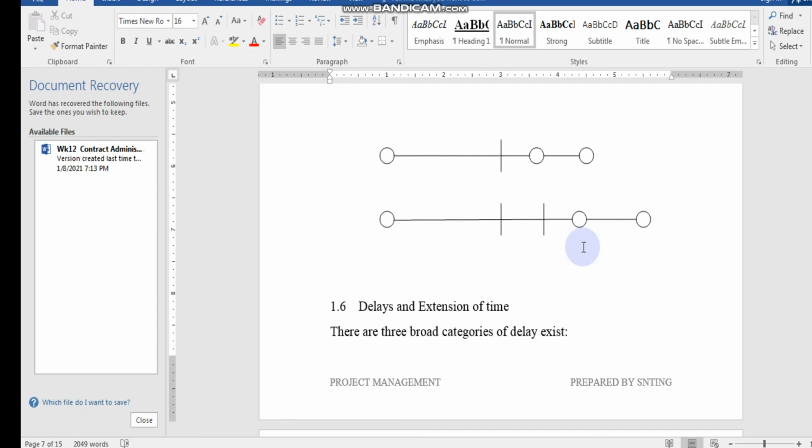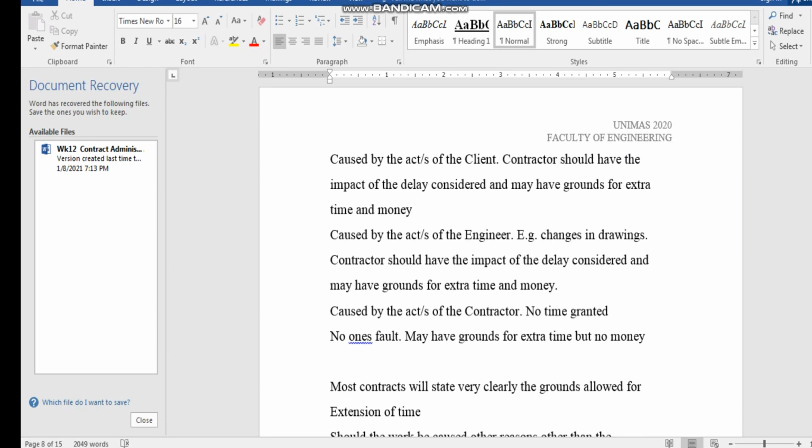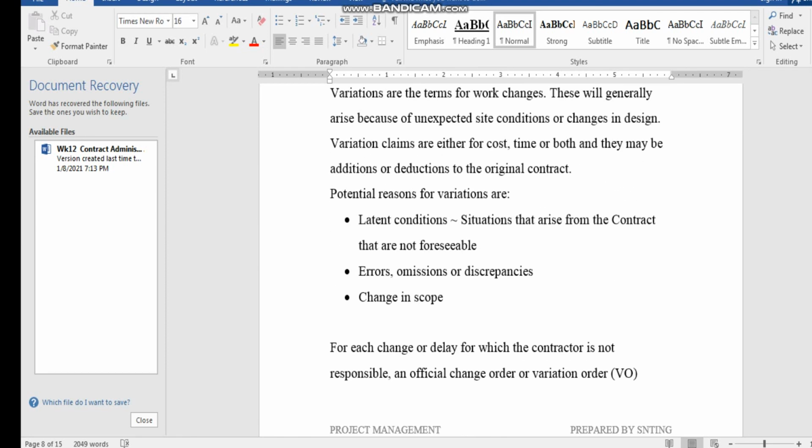And next thing, of course, is the defect liability period. You want to be discharged in the next 12 months. You don't want it to lengthen again and again, and you are forever stuck on the site with no idea when your duties will be discharged. So the key is to apply for extension, study the extension of time, and then the client will grant or not grant, depending on whose fault and whose action is causing that. Okay, variation we covered already.